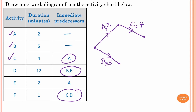We don't know where E is yet, so we skip D for now and move to activity E. A is a predecessor of E, and since activity E and B join together, this is E with a weighting of two. Now we can go back to activity D — B and E are immediate predecessors — and connect to the vertex shared with C. Activity D has a weighting of 12.